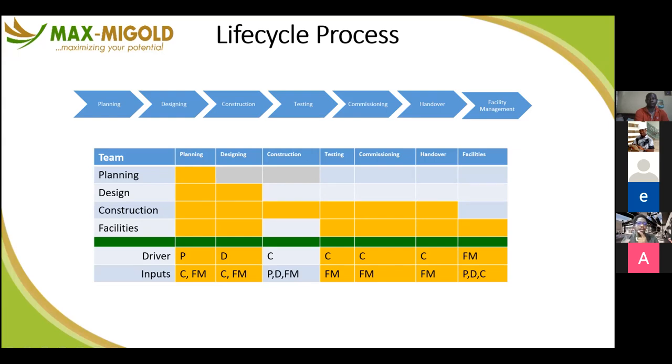On the other hand, commissioning is different. Commissioning is not a check or test of functionality. It's a check or test of adequacy. If this hall is cooling because the AC is working and there are just a few people in the hall, the AC will feel like a super AC because there are three people in the hall.